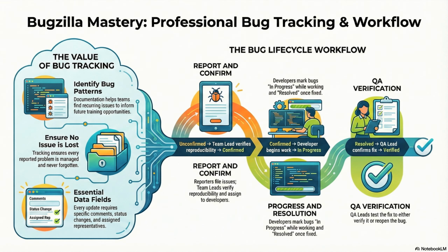Why complicate it like that? Because it teaches them about blockages. In the real world, you can't fix the login screen if your teammate hasn't fixed the database connection yet. Forcing them to link bugs as dependent makes them track those bottlenecks. It teaches them that my work relies on your work.